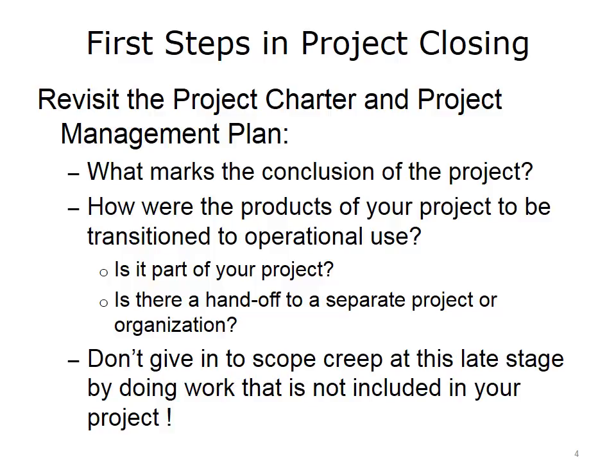For the first steps in project closing, refer to the project charter, project scope statement, and revisit the project management plan. Clarify how the products from your project were planned to be transitioned to operational use. What was in the plans for transition, and to what extent is transition part of your project? It could be that your project hands off this responsibility to another organization or follow-on project. Be mindful of the potential for scope creep at this late stage by doing extensive transition activities that were not included and budgeted for.